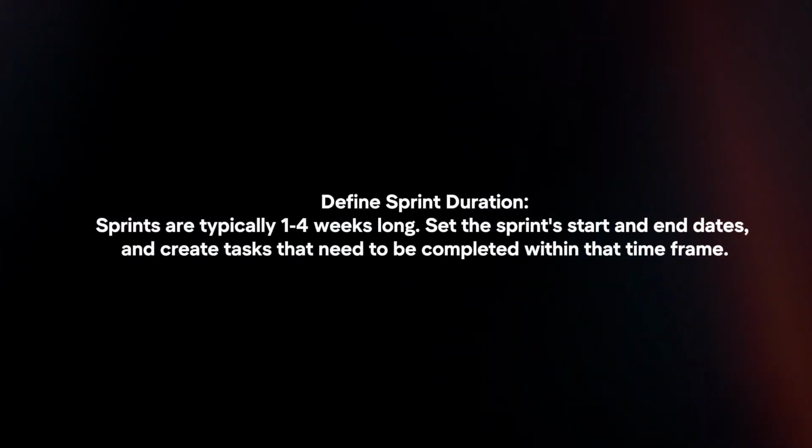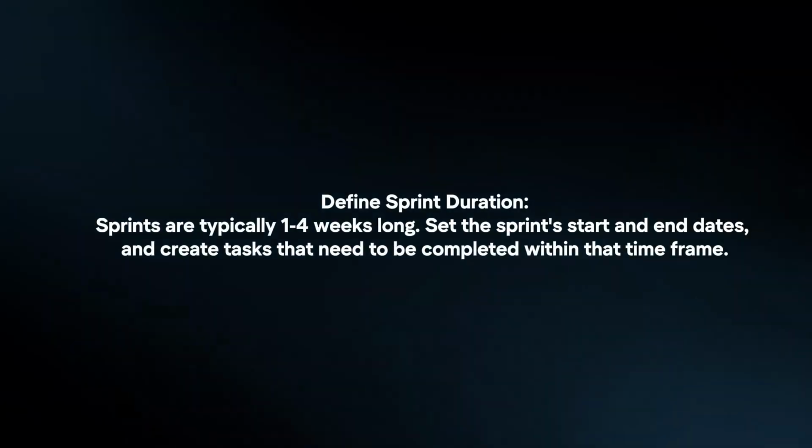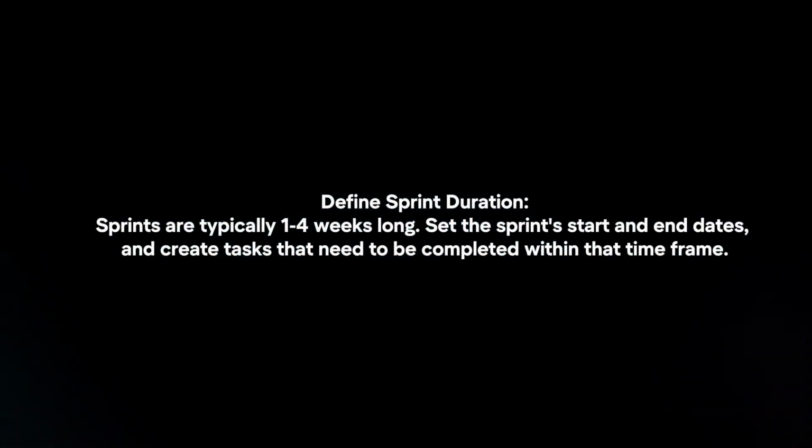Define sprint duration. Sprints are typically 1 to 4 weeks long. Set the sprint start and end dates and create tasks that need to be completed within that time frame.